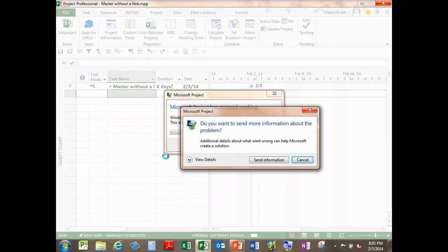So then you insert the short name column in there, and you can now get what tasks go for what projects in addition to the resources combined. But take that short name field and make sure you copy it into the global or it won't show up. And then you populate it in both projects.